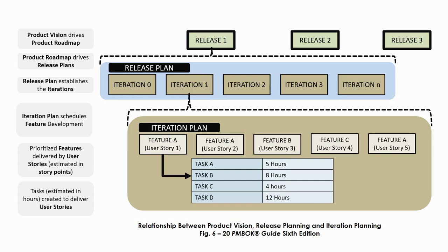So the bottom line is Agile release planning is used as a tool and technique in developing the schedule, especially in Agile related projects. So when you think about release planning, think about your release planning as a very high level plan for the different sprints. And this gives the team an idea of the passage of time and the key milestones while delivering working software to the client. And that is on page 216 in the PMBOK Guide, 6th edition.